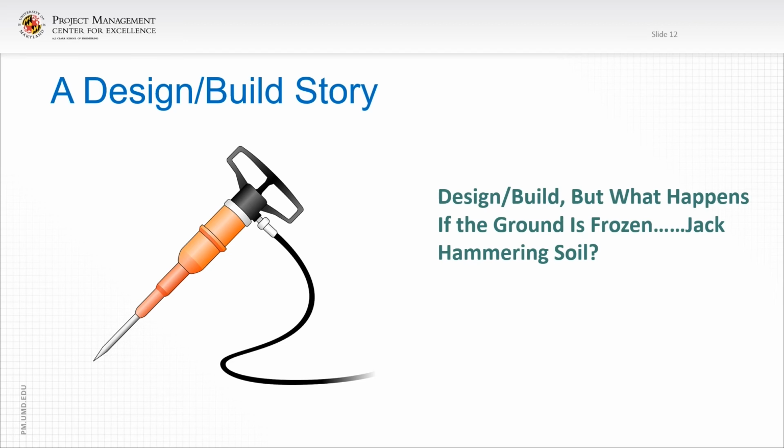So we went to the owner and we said, listen, we can start now and go through these extra costs that would be incurred as an extra to the contract due to differing site conditions, or we can wait 2 months until spring starts and then have a quick and fast running start to do the job.